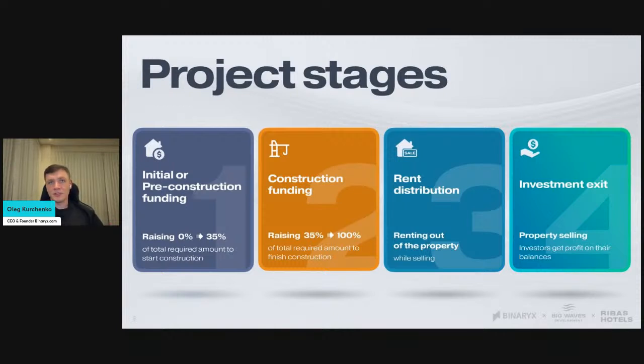So that is a really simple way you can make a decision and understand how the property is being constructed and if it's going through. Developers never receive the money if there are no changes in the property construction. First, he needs to upload the report. The auditor will go and see if everything is okay, and only after that do developers receive their funds.